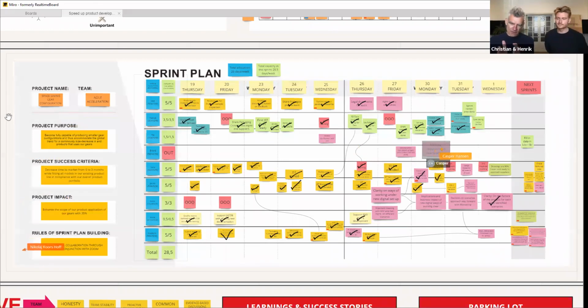But after putting up the sprint backlog items, we asked people, pretty much traditional project management, to define individually what your stepping stones are in getting to those sprint backlog items, to delivering that. They did that individually. Somebody in teams of 2, like the design engineers who worked together, or 2 people from supply chain.